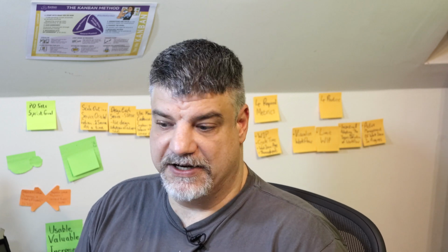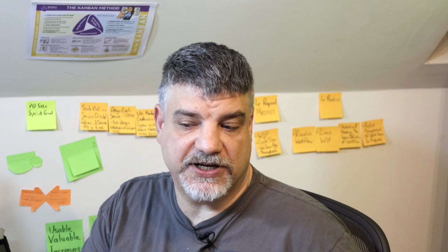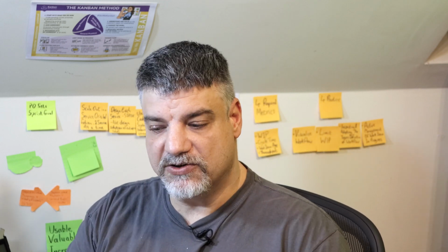Here's my hypothesis. Here's the experiment or the probe I've designed. Here's what we'll do to measure that. And here's what we'll do if that goes well. And here's what we'll do if that goes badly. And now we've got a nice little time box potential experiment. It might not be time box, but hey, we can decide up front. And this all leads to a probe. So we probe, sense, respond. And what works, we do more of. And what doesn't work, we do less of.